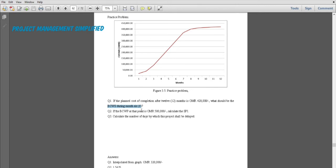The second part says that if the BCWP at the six-month point is 500,000, calculate the SPI. The SPI is BCWP divided by BCWS, so that is 500,000 over 320,000, and we will get a value of approximately 1.5625.